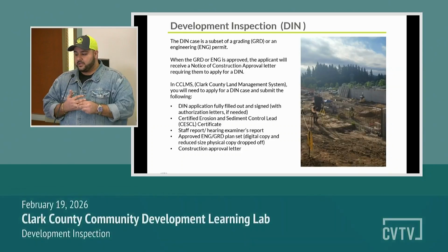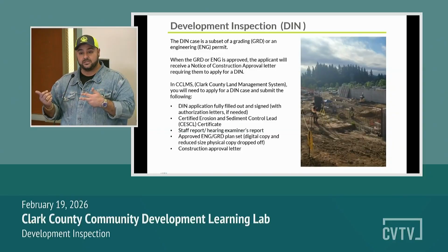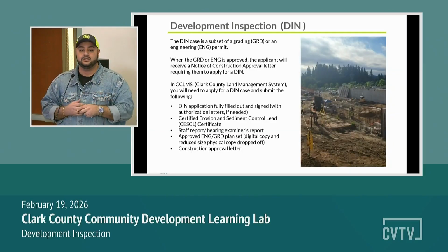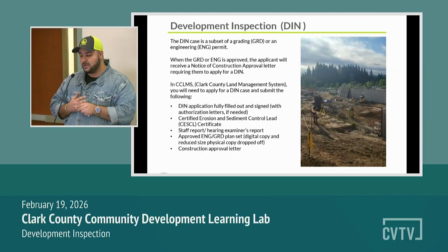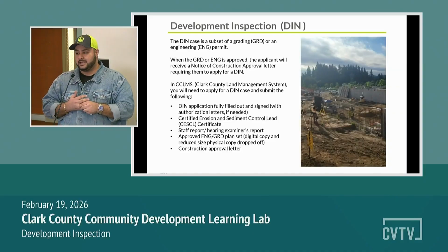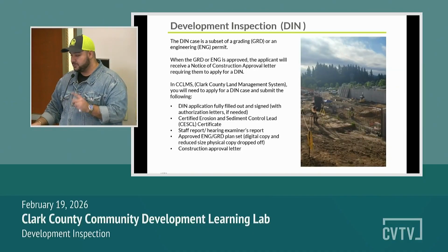Then we will require you have the approved engineering and grading plan set. Those will need to be digitally uploaded as well. The full set, this is the approved set that we reviewed, as well as the 11 by 17 reduced size version that we will require for you to be dropped off here in this building. And then lastly, you'll need to upload a copy of the construction approval letter, which you will have a copy.